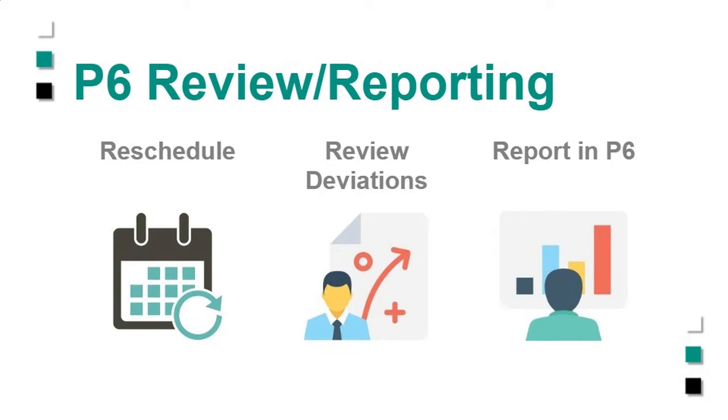And then you can see the updates that they've submitted: start, finish dates, on hold dates, suspend, resume if you use that, resources if you use that, steps if you use that, expenses. You review it, you can reject certain updates if you wish, and then they will see that up in CAPPS. They can resubmit and whatnot. So the point is to make it easier for updating, not to put a bunch of overhead in the middle with a bunch of approvals, having to go into other software to do those approvals. That was not our strategy here.